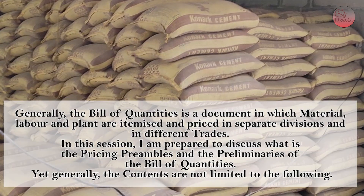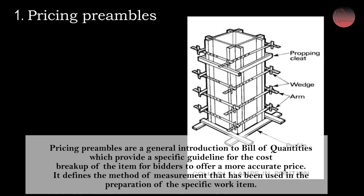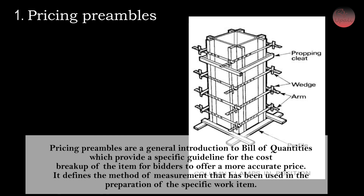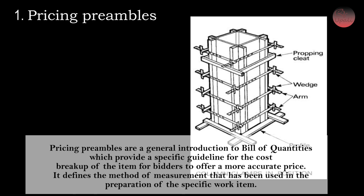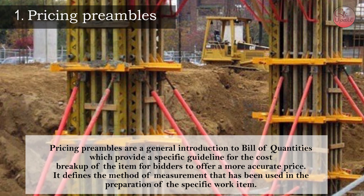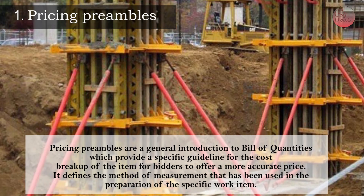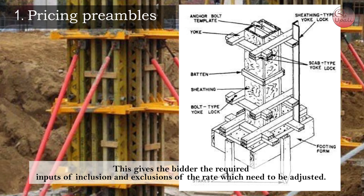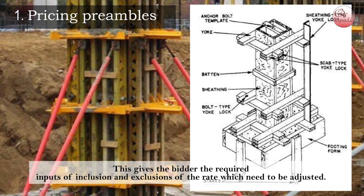Generally, the contents are not limited to the following. First, Pricing Preamble. Pricing preambles are a general introduction to the Bill of Quantities which provide specific guidelines for the cost breakup of items for bidders to offer a more accurate price. It defines the method of measurement used in the preparation of the specific work item. This gives the bidder the required inputs of inclusion and exclusion of the rate which need to be adjusted.